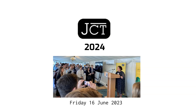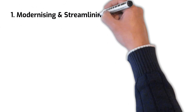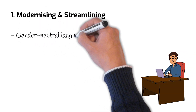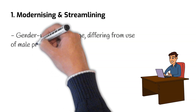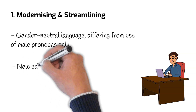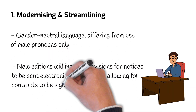The main features of the JCT 2024 suite have been reported, which includes updates and changes corresponding with the following work streams. Number 1: Modernising and Streamlining. JCT has reported that the new editions will take a progressive approach with the adoption of gender-neutral language, differing from previous editions' use of male pronouns only. JCT have also confirmed that the new editions will include provisions for notices to be sent electronically, as well as allowing for contracts to be signed electronically.